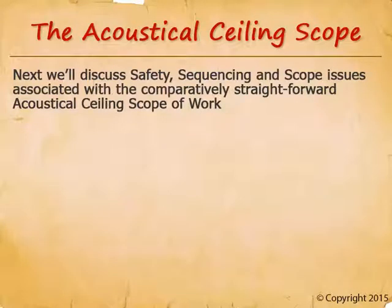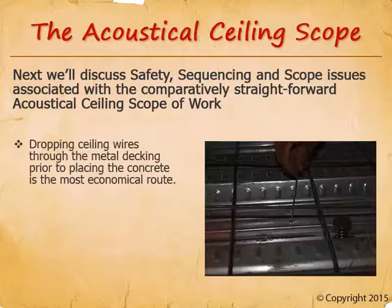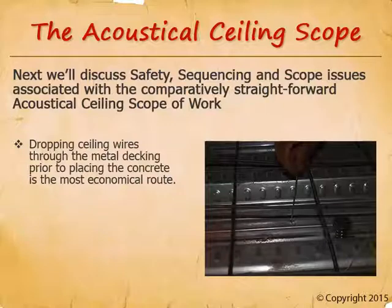Acoustical ceiling sealing wires are most economically installed by dropping them through metal decking before concrete is placed, but this creates a grid of dangling pointed wires that presents a safety hazard and gets in the way of MEP work. MEP subs will cut the wires but won't replace them or pay for replacement. Drilling or shooting sealing wires into the bottom of the concrete deck immediately prior to grid installation is safer, though more expensive, and keeps wires out of the way of other trades.